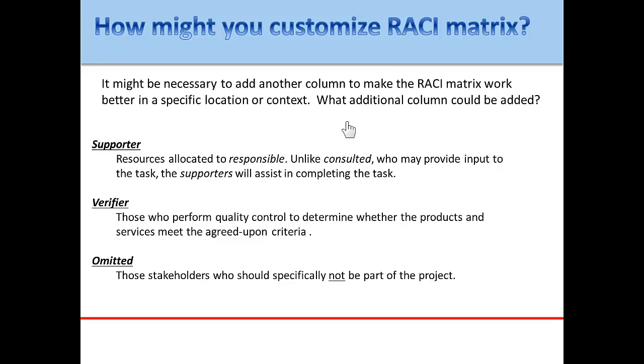Here are some of the ideas that I came up with. I'm sure you had some of these and some other ones in your minds. You might need a column about who will be the supporters. They might not necessarily be responsible, accountable, consulted, or informed, but they might have a specific role of providing support. These could even be those people that the person responsible has delegated.